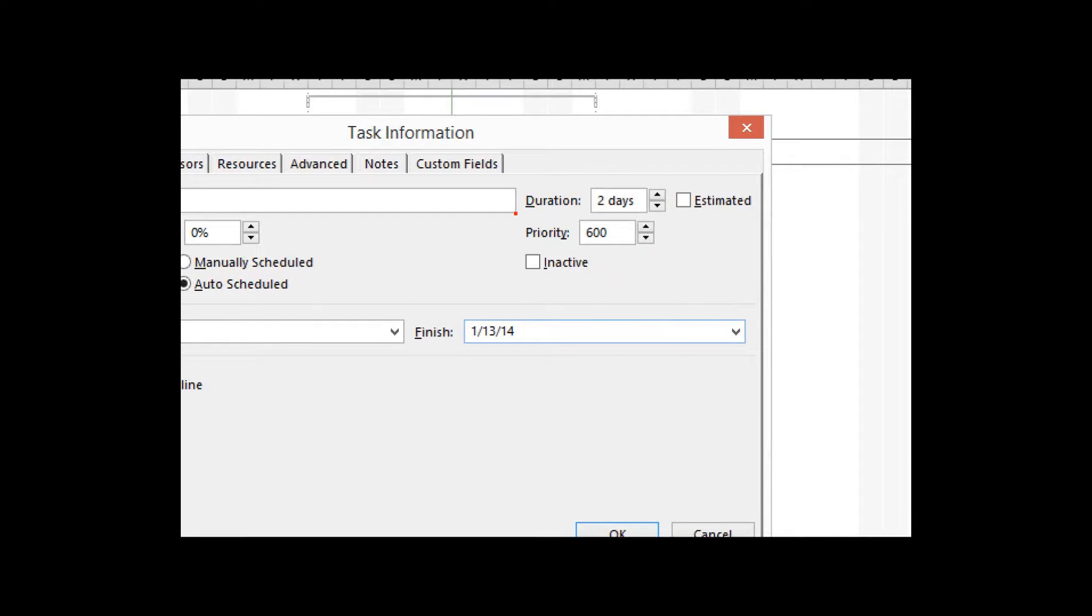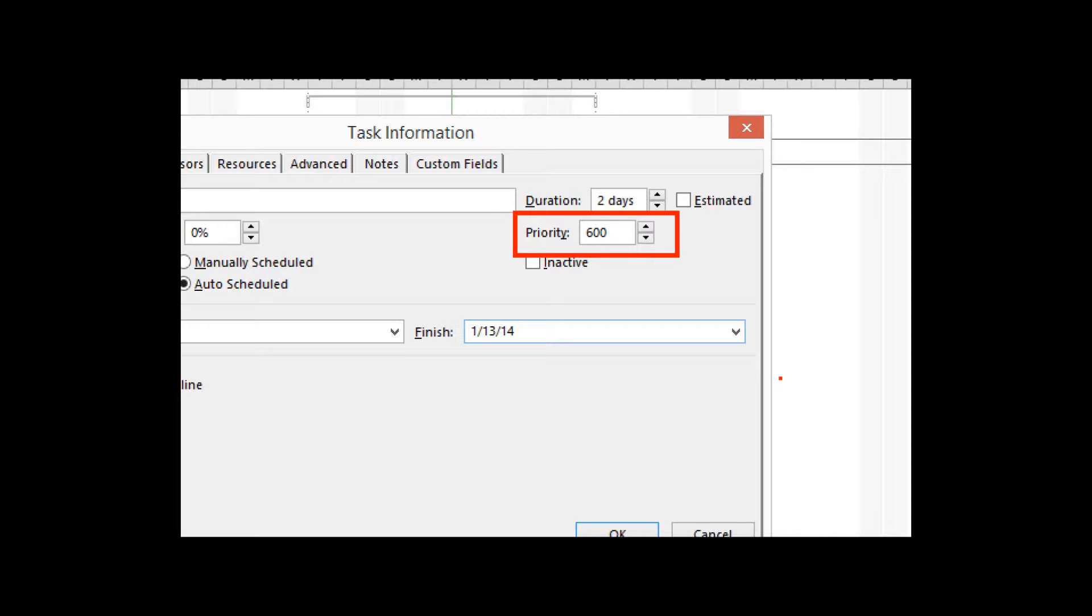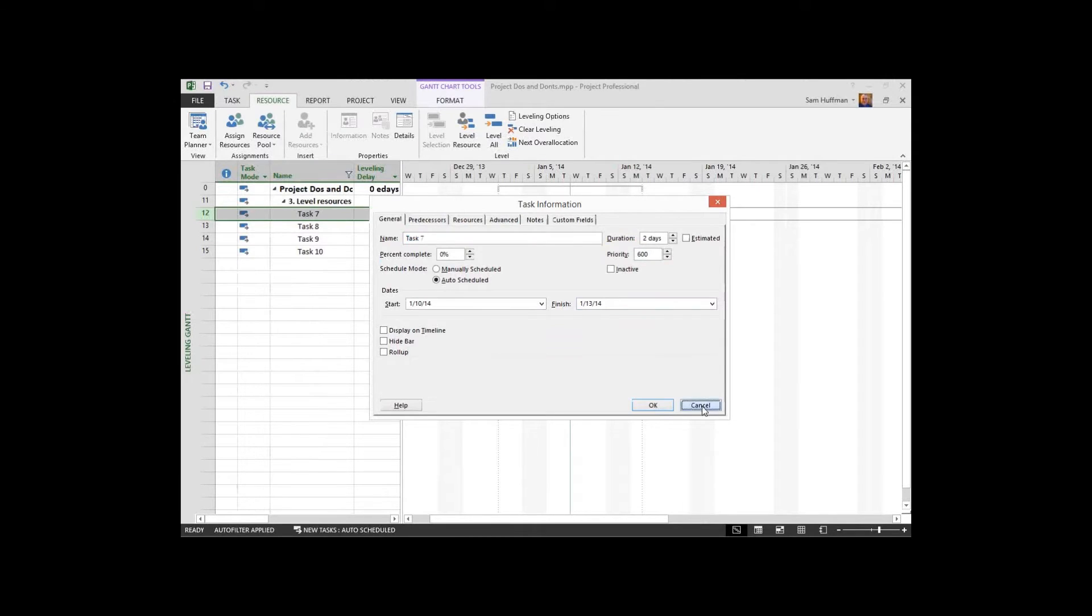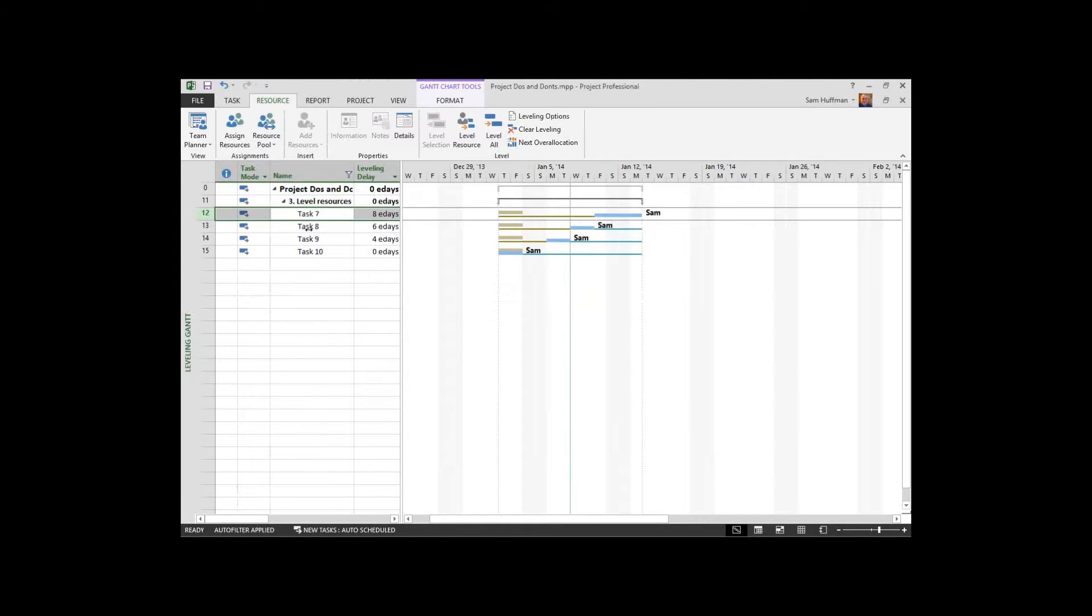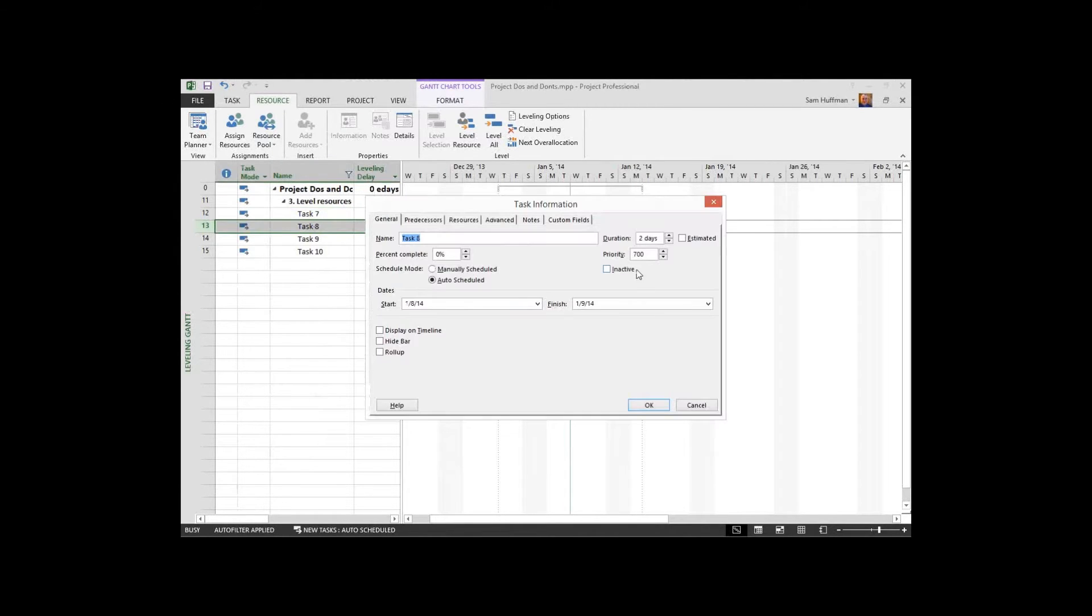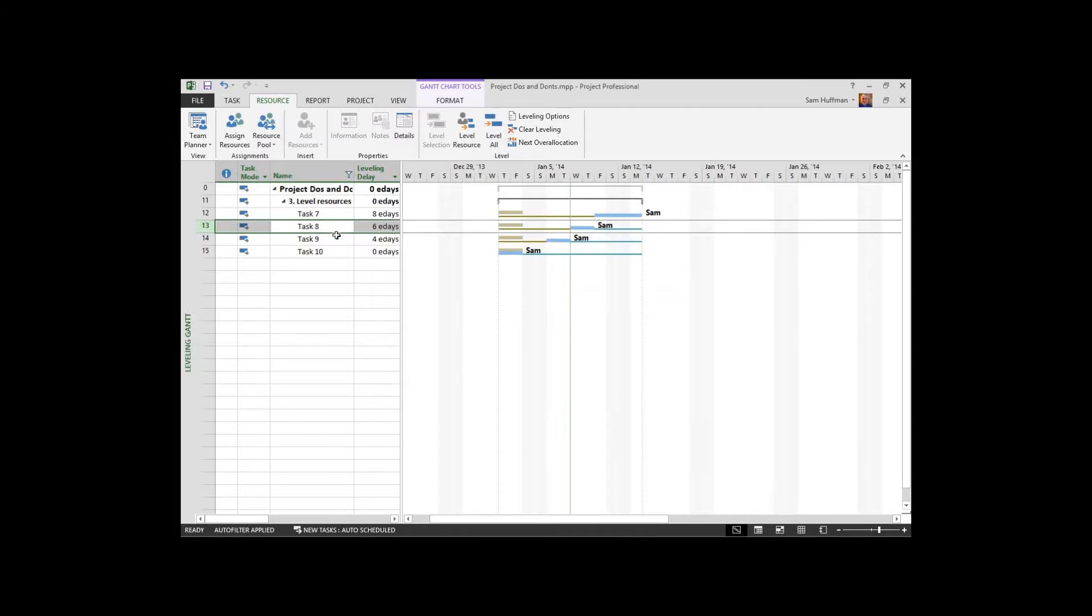This is telling project the priority of the activity for leveling purposes. The numbers go from 1 to 1,000, 1 being the least priority, 1,000 being the highest priority. So the project team elected to make 500 the default, which is middle of the road. This one has a higher priority. But it was still the first one that was pushed out. Let's go to the next task and I'll show you why.